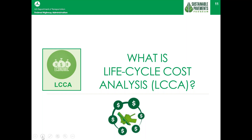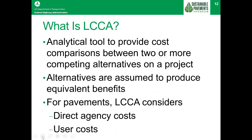Now I'll be talking about the fundamentals of what is life cycle cost analysis. Life cycle cost analysis is an analytical tool to provide cost comparisons between competing design alternatives. It is assumed that each alternative provides the same benefit or performance by considering all of the costs, which include for the agency: initial construction cost, rehabilitation cost, and maintenance cost. For users, it includes vehicle operating costs, user delay costs, and crash costs that are incurred during the service life of an asset. This analytical process helps transportation officials to select the lowest cost option.